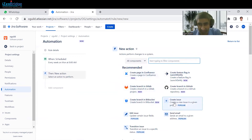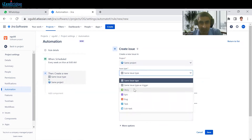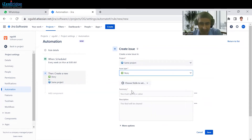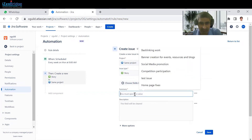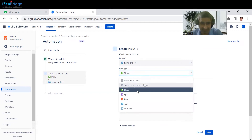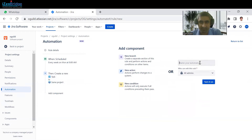This is the trigger. Now, what we want to create is an issue. What kind of issue — story, task, or bug? Just select the issue type. Suppose we want to create a task after every week. Just provide the description — let's call it 'any weekly task'. Whatever description you want to apply for that. This is the summary of that particular task. Click on save.